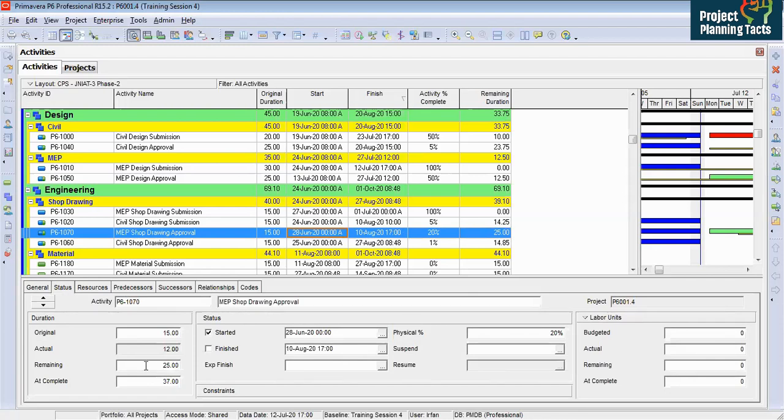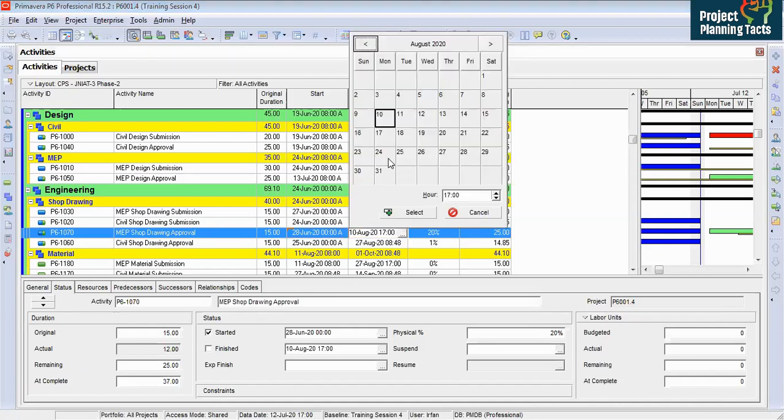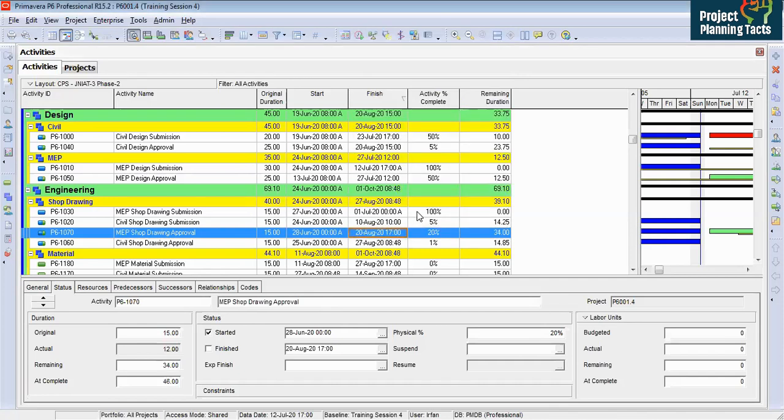You can calculate, but in this case, you have to go to your calendar, check if there are any extra or public holidays, and whether you have a 5-day or 6-day calendar. Accordingly, you calculate. So the easiest way is you can ask the engineer when he is finishing this activity, like the anticipated finish date. He would say 20 August, I will finish this activity. So you come here, you click on it, and you can select from here 20 August, select the activity, and accordingly this remaining duration will change.